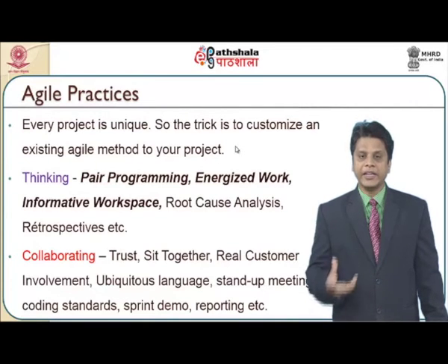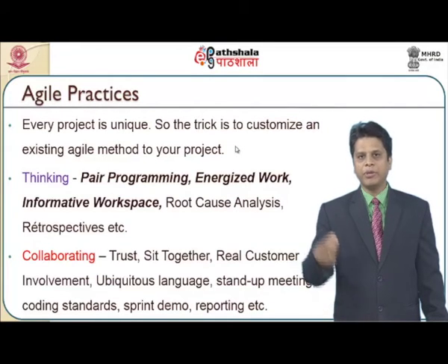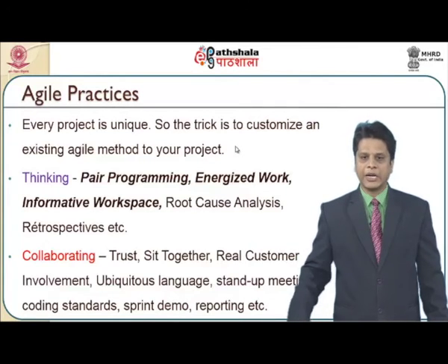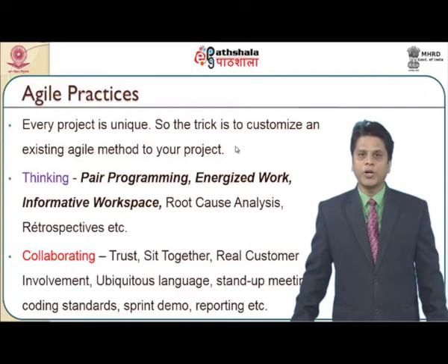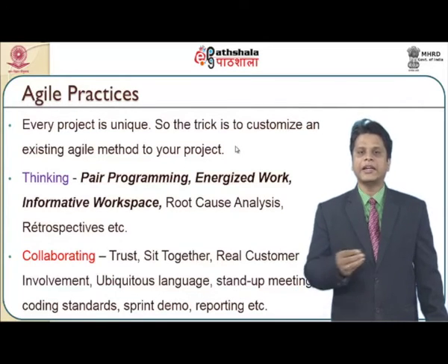Every day for at least 5 minutes, everybody will assemble in a room. What they worked on the previous day, and what they plan to work on that particular day, will be brought up during that stand-up meeting session. Then we will bring out a common coding standard which is mostly acceptable to my customer and also to my developer. Then I will go for a demo of the entire sprint.